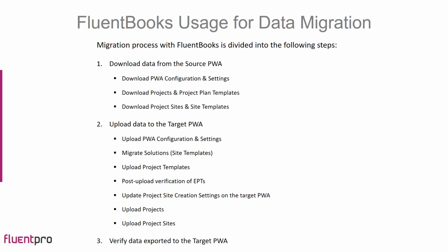And then we upload projects, making sure that project sites are not created during the upload. And the last upload activity is uploading SharePoint sites and project sites. After all the data is exported to the target PWA, it's time for verification of all the data and validation.